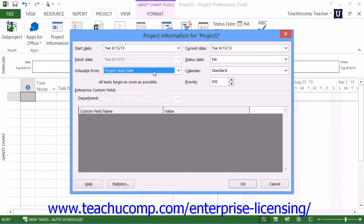Scheduling from a specified start date causes projects to schedule all tasks to begin as soon as possible. This also gives you the most scheduling flexibility when entering tasks for the project.